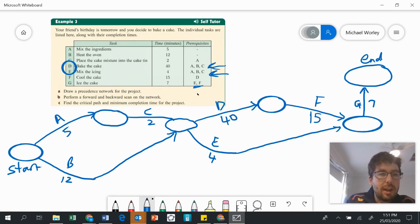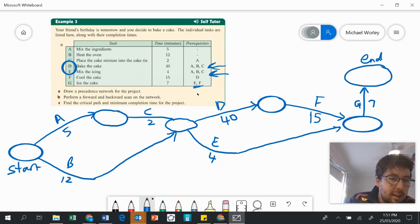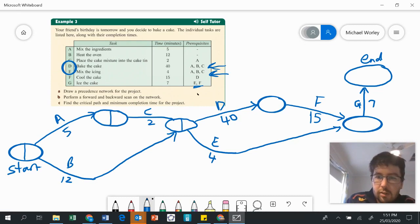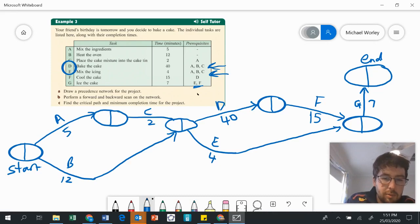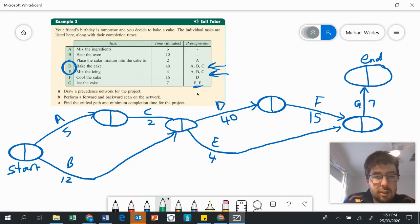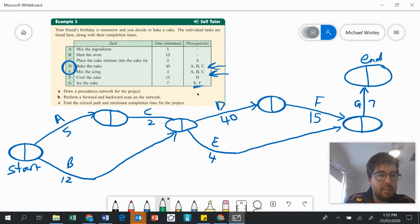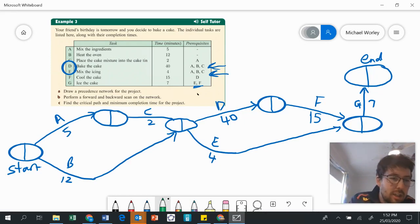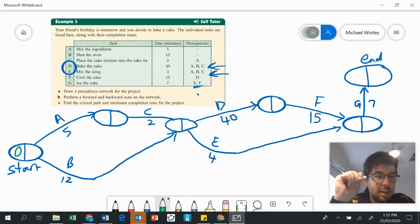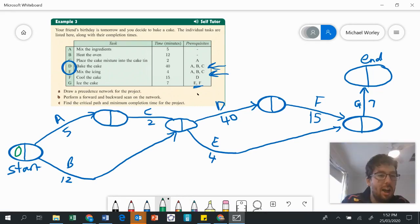Now we're going to do part B, which is performing a forward and backward scan. In each of these ovals, we're going to divide them in half. I'm going to change color to green just so it's easier to see. We're going to now do our forward scan. Forwards means we're going to be moving from left to right across the diagram, from the start to the finish. To do our forward scan, we start by putting a zero at the very start.